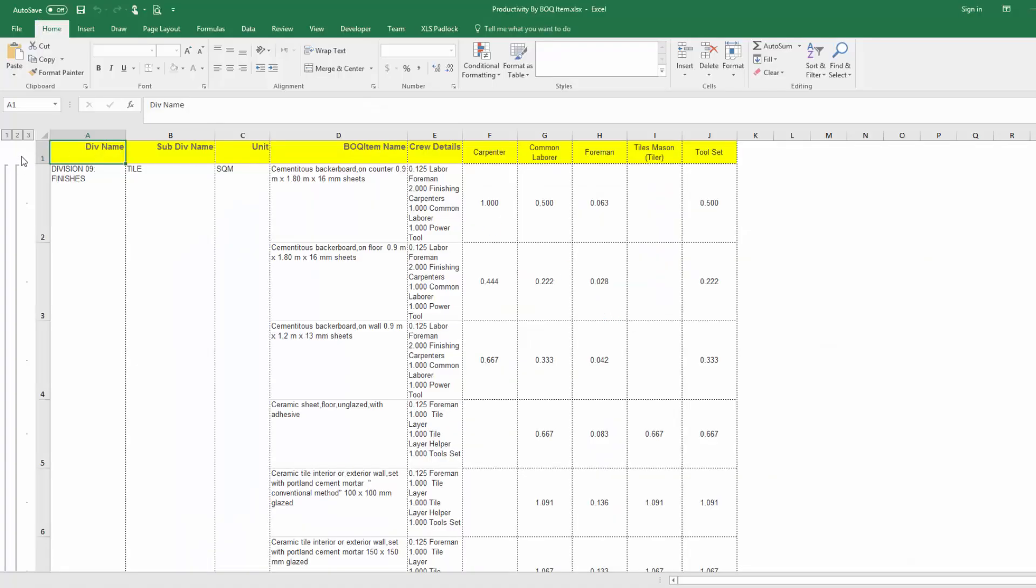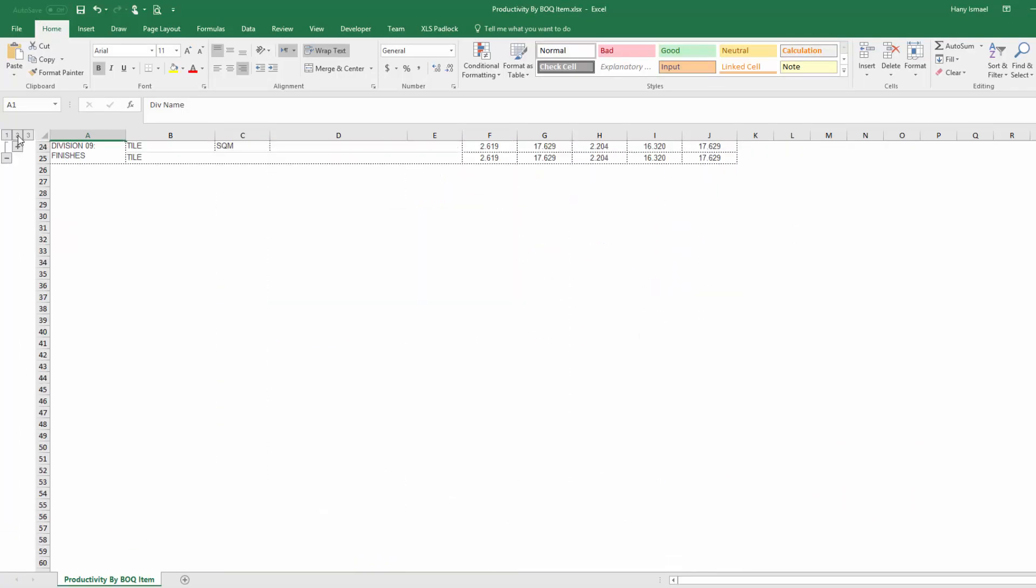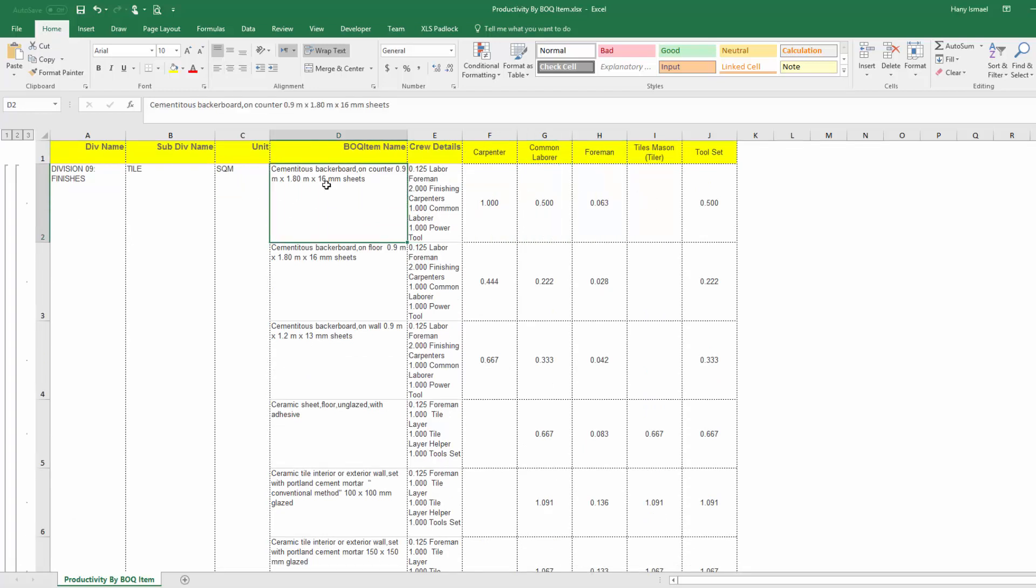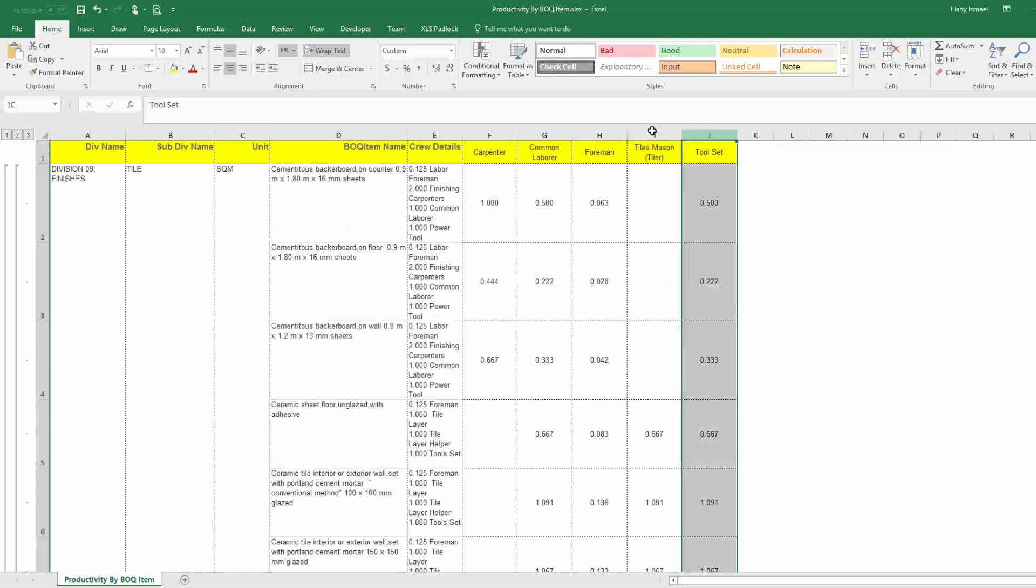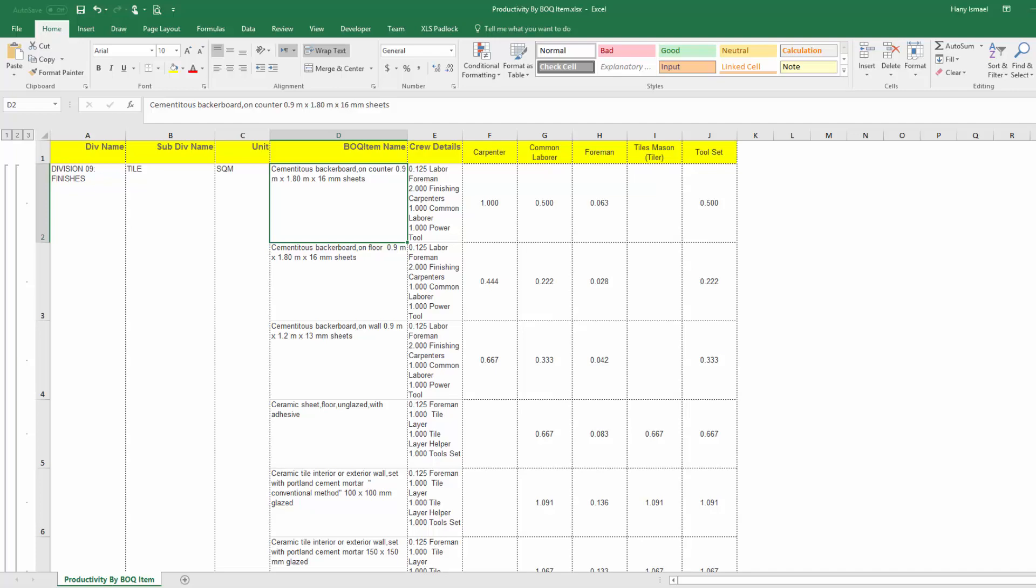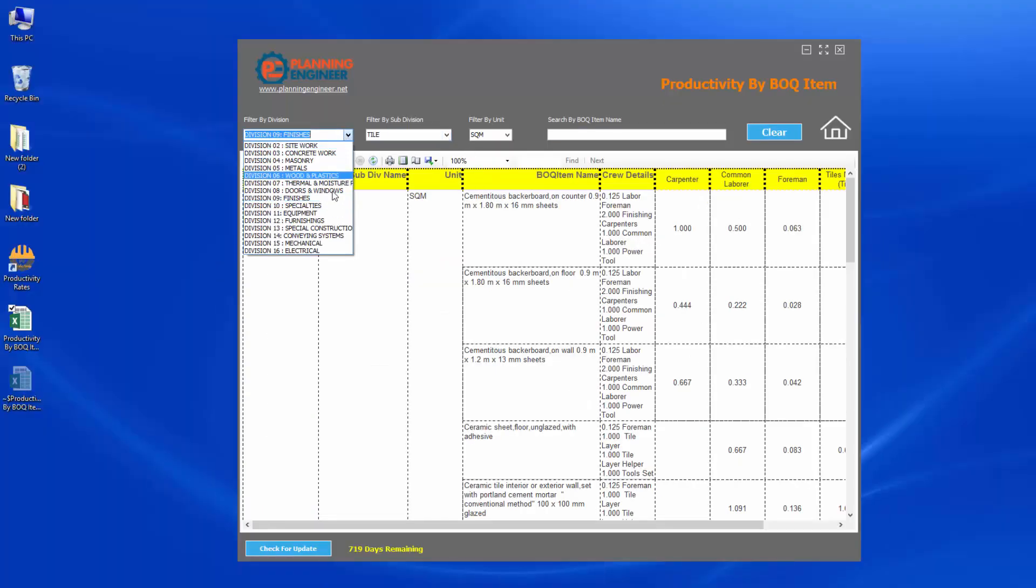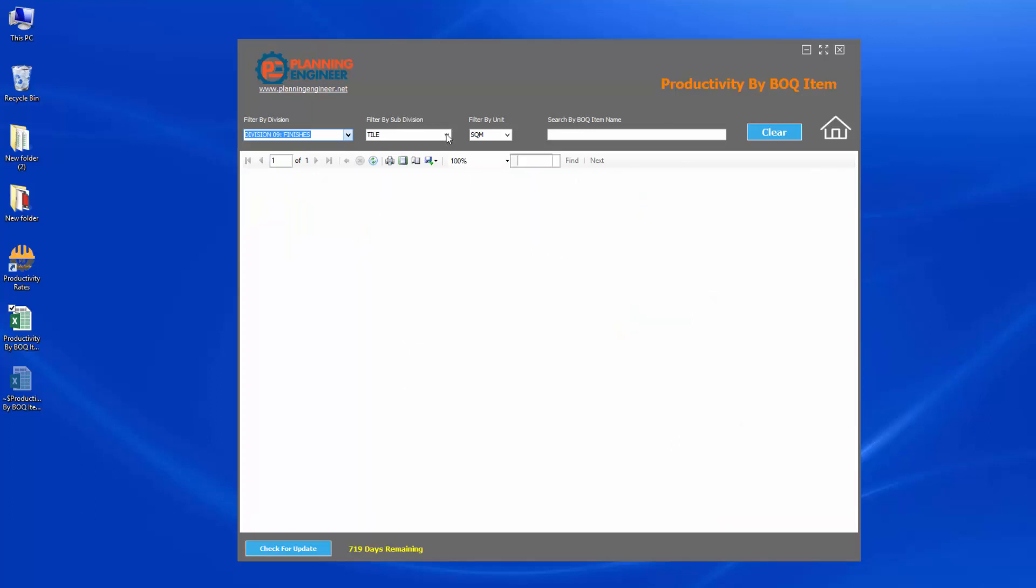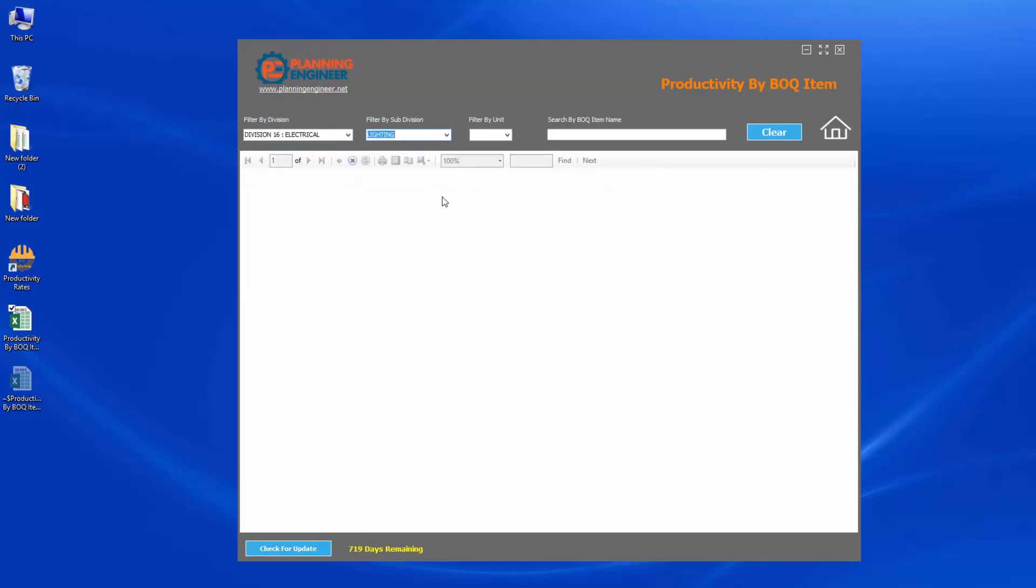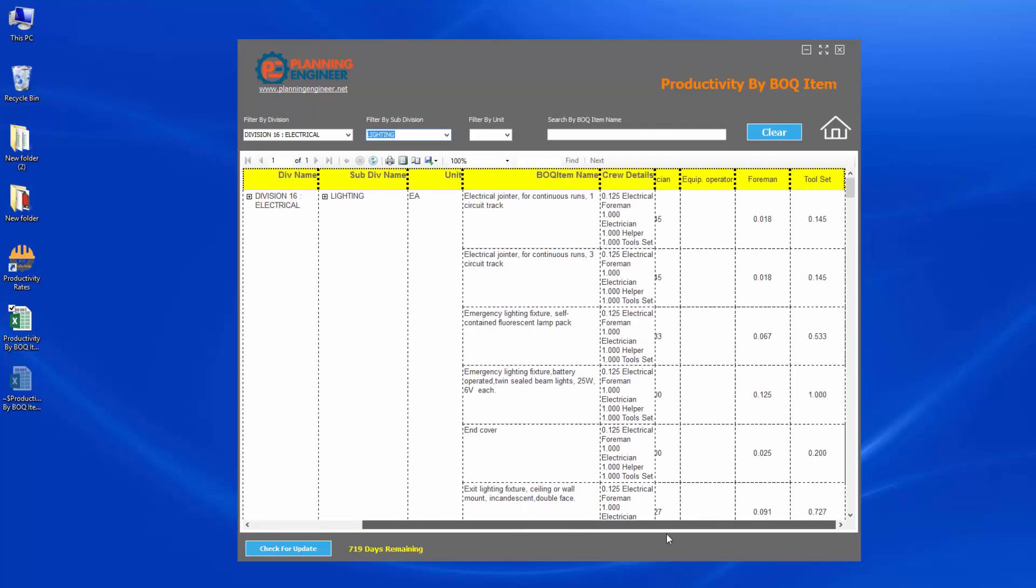Now you can open the file and you can find it organized exactly as you see in your screen. And here is the file. It is grouped by division and subdivision and the item. You can use these hours, this hours per unit. It means if you have here for this item, let's say 100 meter, you want to multiply this hours by 100 to get the hours for the manpower and the equipment. So these columns are according to the item you're selecting. So if you select different item, you'll find different columns. Let's say here, we'll go to electrical and we'll select from the subdivision. Let's say lighting. You'll find different column and different equipment.